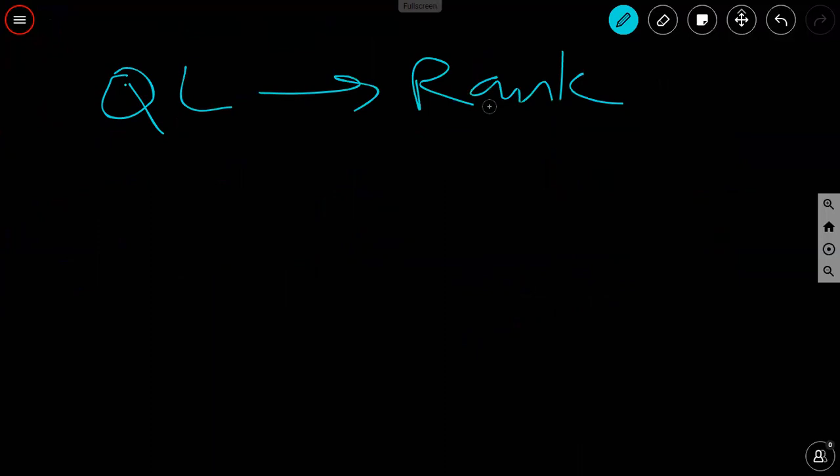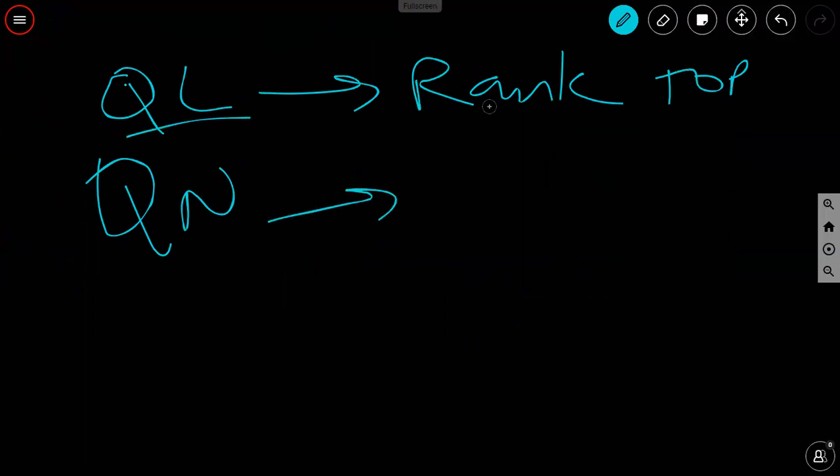All right, so after you've done your qualitative and quantitative risk analysis, hopefully the qualitative is going to help you to rank the risks, do a first pass, and then for the quantitative, you take a look at the top risks from the qualitative and find out the quantitative information for those.